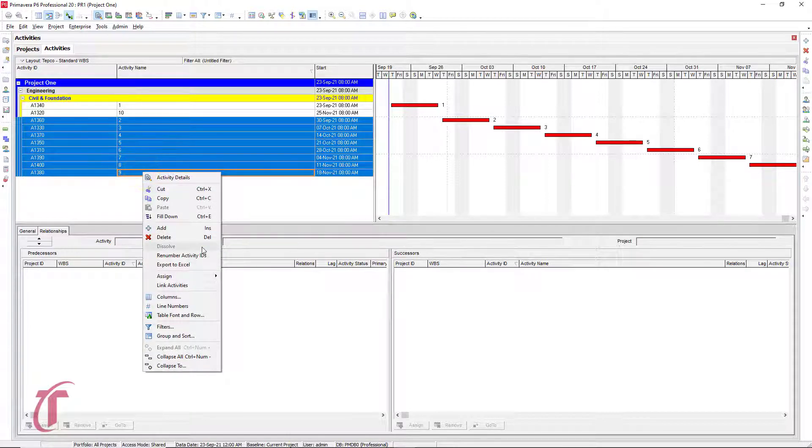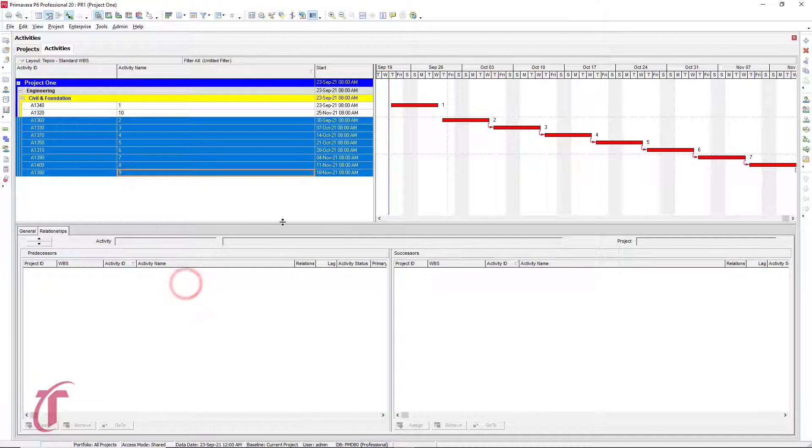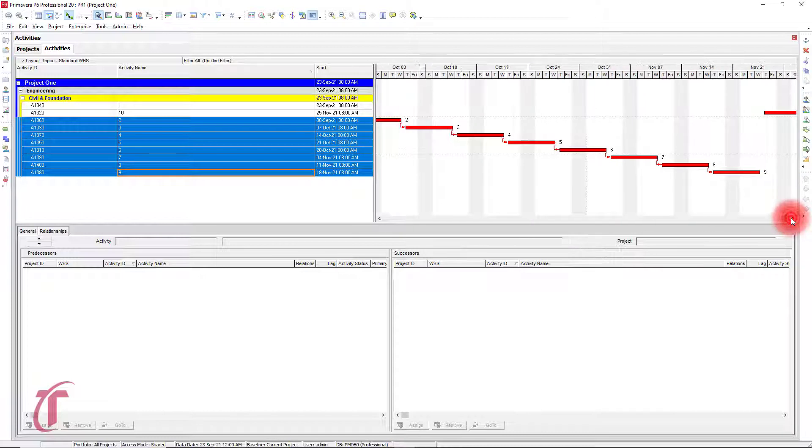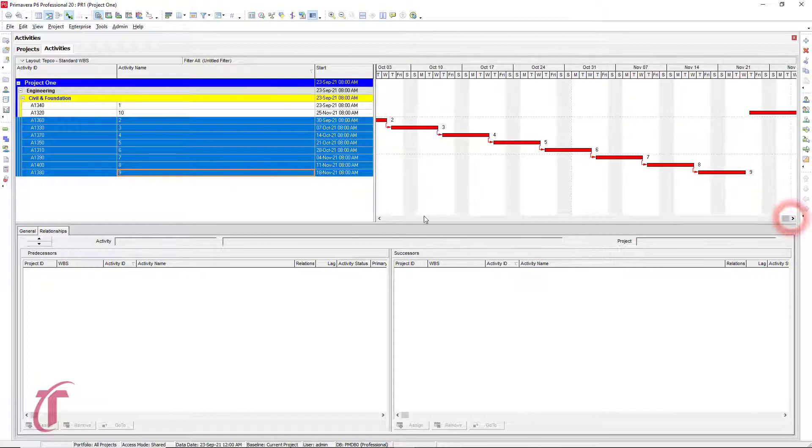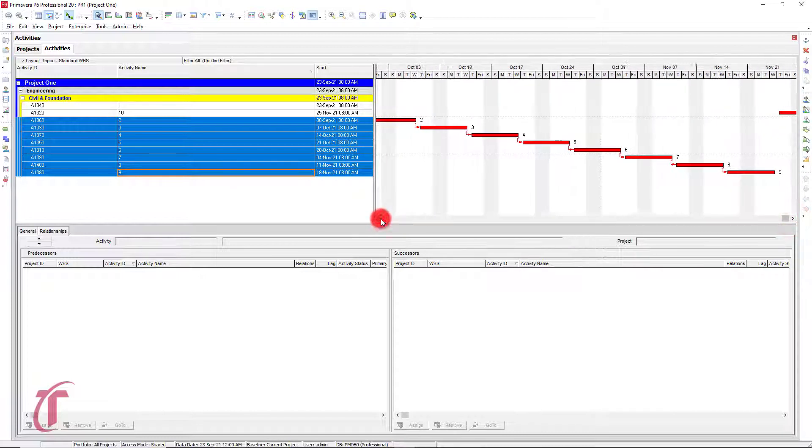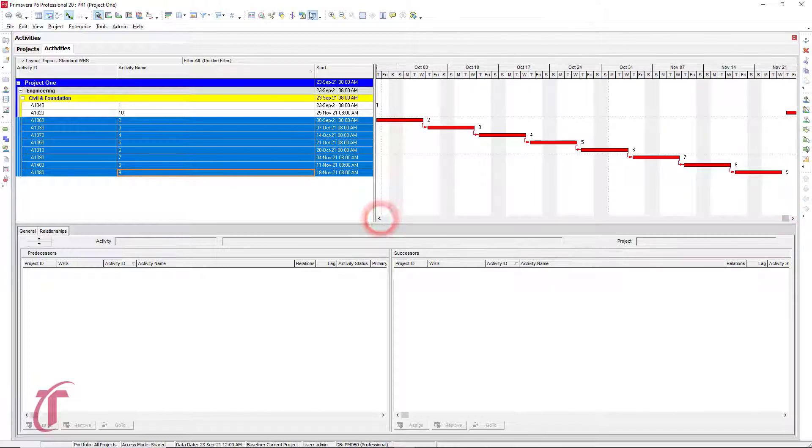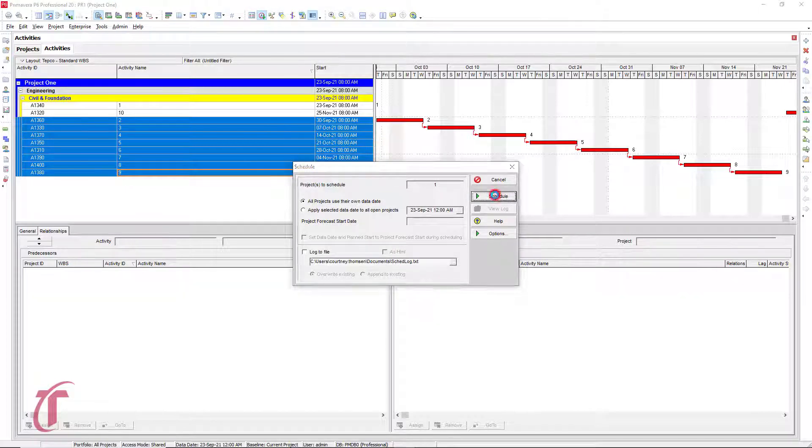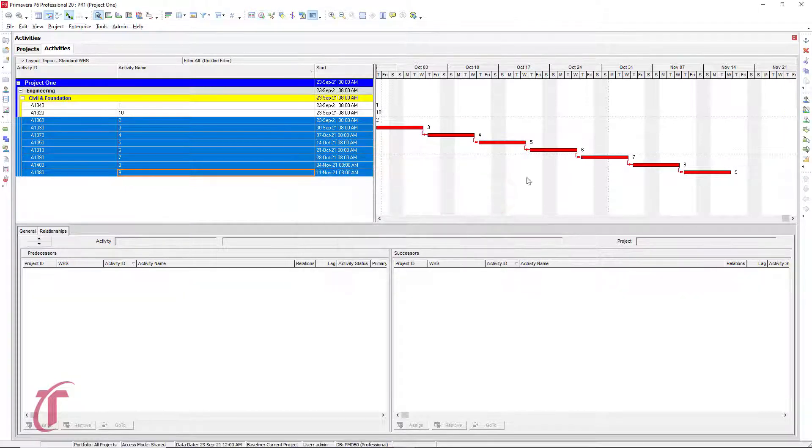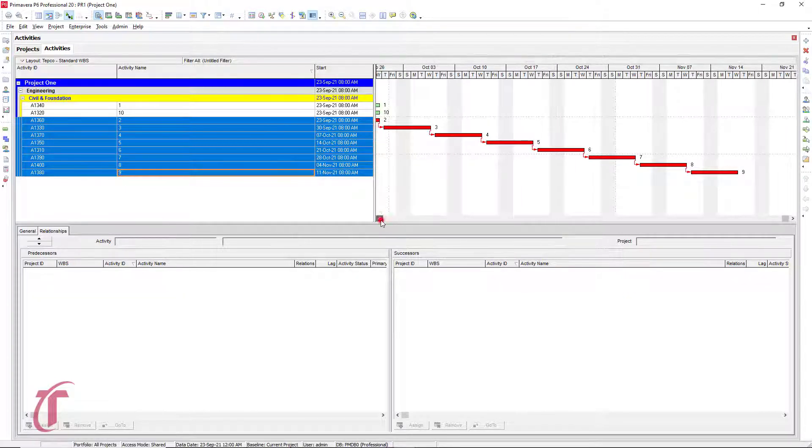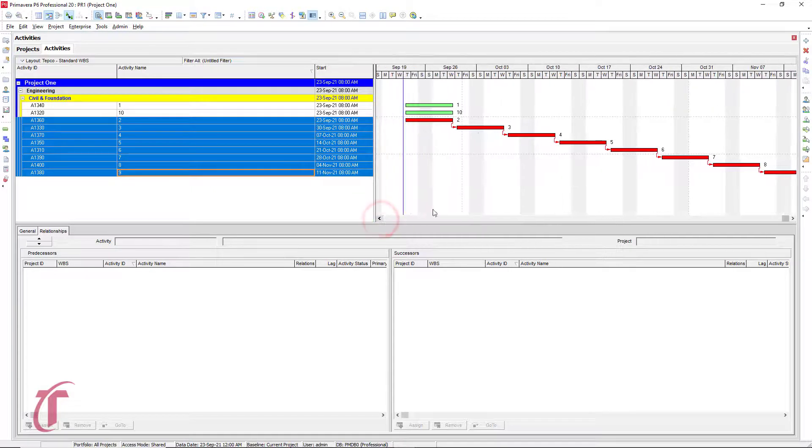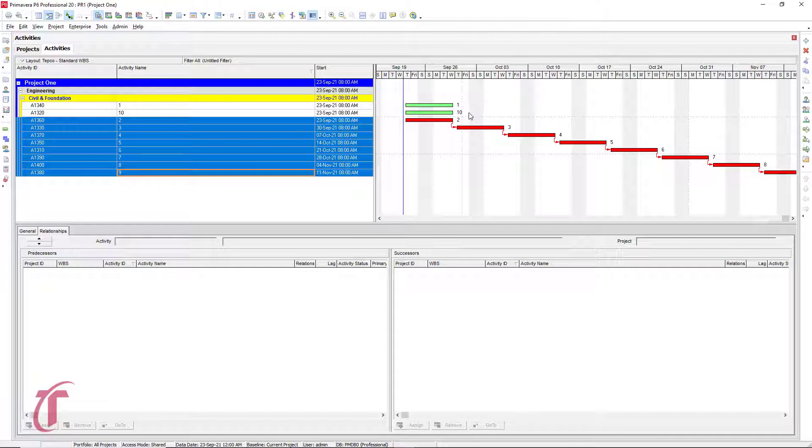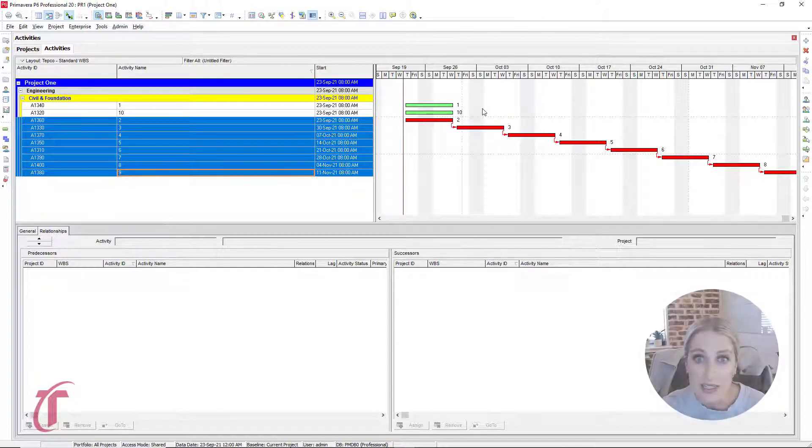Again, right click, and then we will link activities. And so we see two through nine have been linked. So then we can press F9 or click on this icon and then schedule it. So notice that we have one and 10 up here that have not been linked yet.